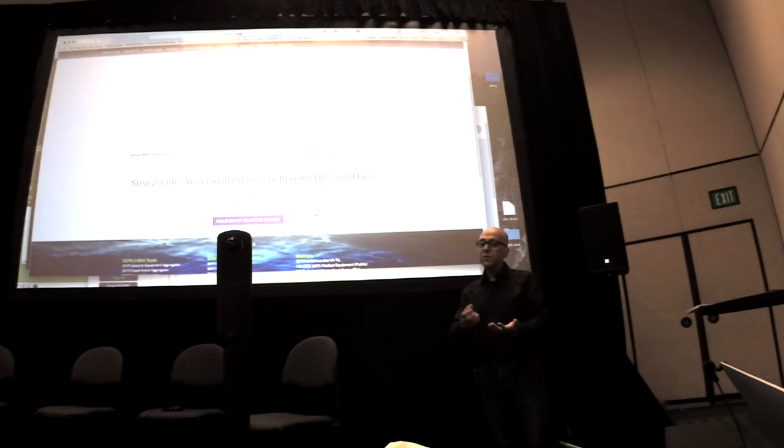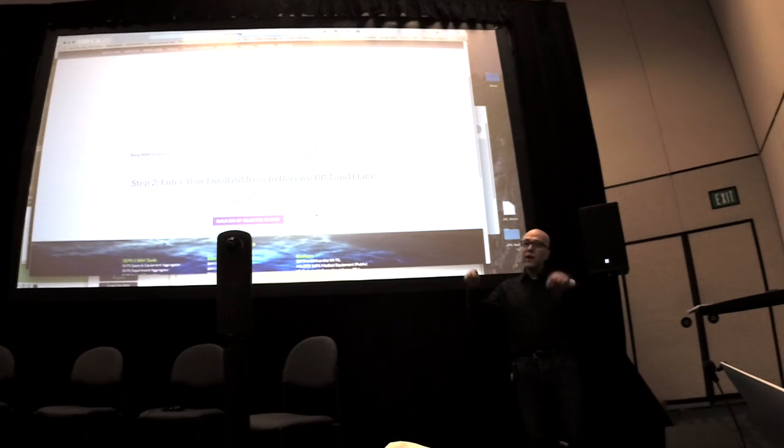You still have the latitude to say, well, I don't really agree with this chair in this room, or this piece of equipment is too big. You can still change it, but this is actually getting into their next contract requirements. Everything in these models has an ID, which means they can track and say, okay, we asked for this kind of chair here. You're putting this other kind of chair, and you can actually do a delta check. And that can even be done in an Excel file, or with tools like what Jonathan showed this morning. You start creating rules and asking for clearances and whatever between pieces of equipment.